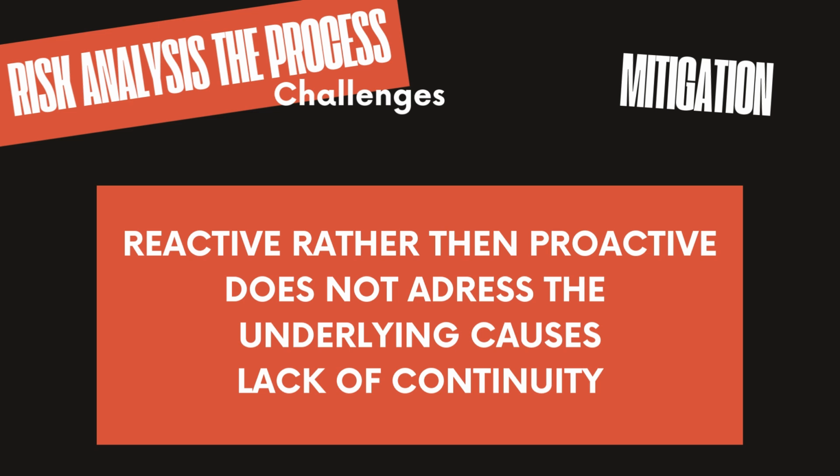But as the project progresses, new risks emerge. Perhaps an external vendor is struggling to meet deadlines, or a global cybersecurity threat puts your data at risk. If you're following the naive approach, your focus remains on the original mitigation plan, those training sessions, without adjusting for the new risks. And that's how naive methods leave you exposed. They treat risk management as a static process when it should be dynamic and responsive.